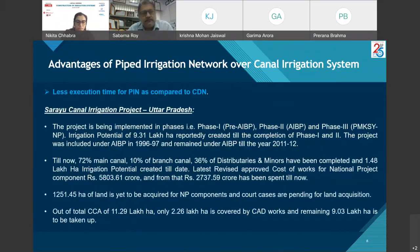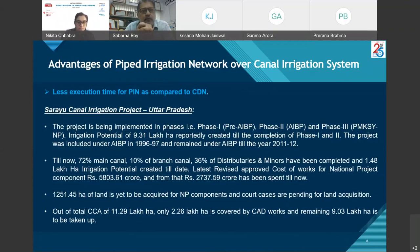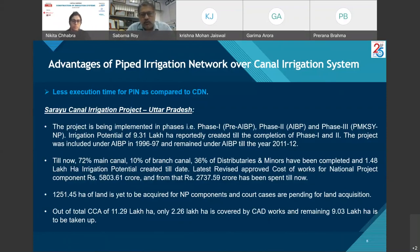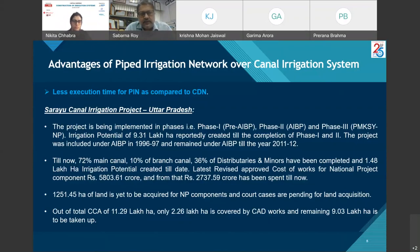Another advantage of pipe irrigation network is less execution time. For example, the Sarayu Canal National Irrigation Project of Uttar Pradesh has been implemented in phases — Phase 1 (pre-AIBP), Phase 2 (AIBP), and Phase 3 (PMKSY national project) — with irrigation potential of 9.31 lakh hectares. The project was included under AIBP in 1996-97 and remained under AIBP till 2011-12.